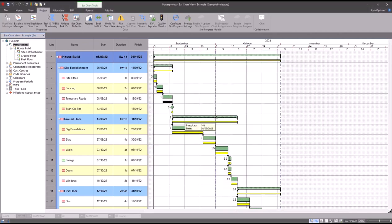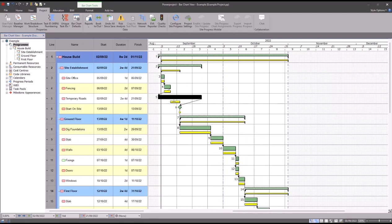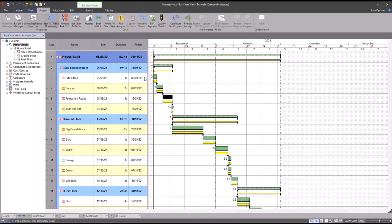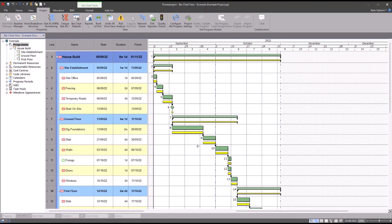With the live task however, this can still move, the dates can move, the durations can move, but this is always going to retain its original dates from where I created that baseline. What this will mean later down the line is if the project ends up being delayed at any point in time, I can always look back and see the variance between my live and my baseline dates. I can always track where I should have been compared to where I am now, and you can even set up your columns in the spreadsheet to show that information. Thank you for watching this tutorial video.